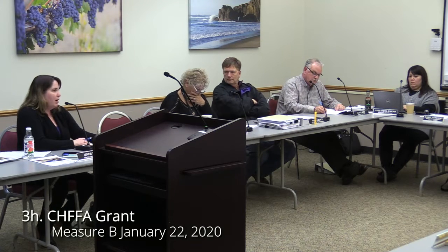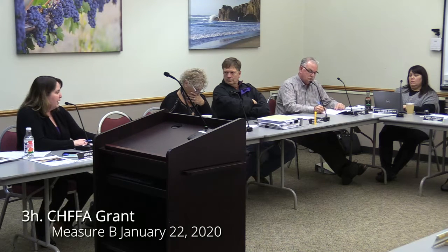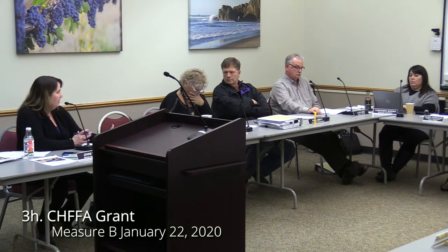They had originally hoped we'd have something by May 2021. Because we're not looking at a house or renovating a house, we've had to relook at our timeline. So we are hopeful that CHFFA will be happy with the November 2021 date, being that we've met the other milestones.